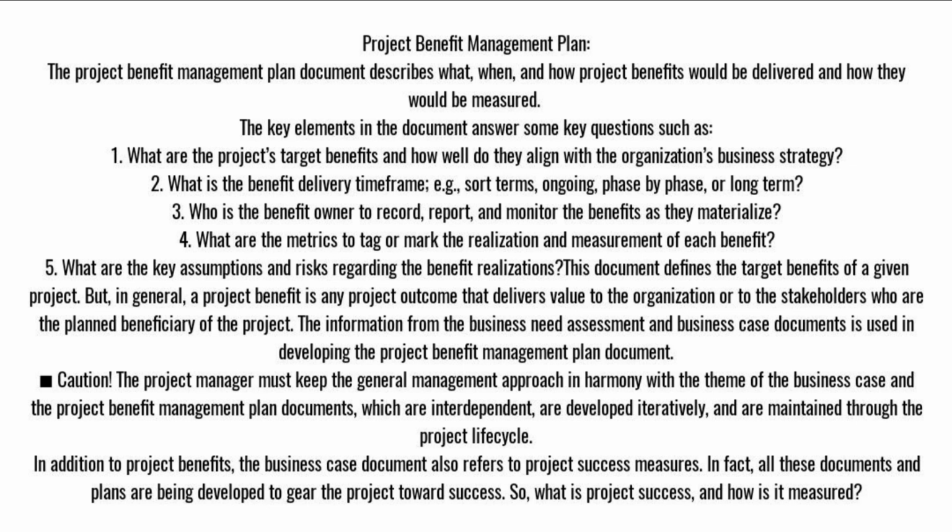3. Who is the benefit owner to record, report, and monitor the benefits as they materialize? 4. What are the metrics to tag or mark the realization and measurement of each benefit? 5. What are the key assumptions and risks regarding the benefit realizations? This document defines the target benefits of a given project. But, in general, a project benefit is any project outcome that delivers value to the organization or to the stakeholders who are the planned beneficiary of the project.